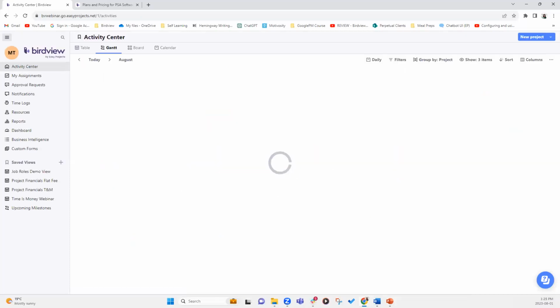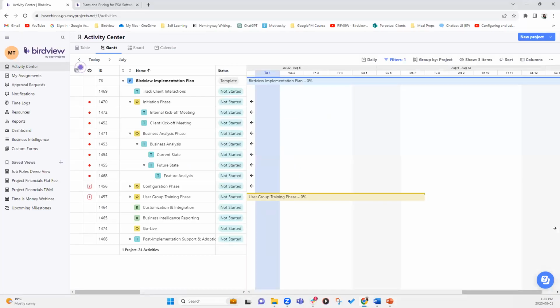All right, so that is for system settings and managed settings. Let's take a look at some questions that we have. So first question is, are archived projects data used in Power BI dashboard? The answer is yes. The archived projects will appear unless you have filtered the data based on time or period, or if you have a custom report that is configured to not show archived projects.